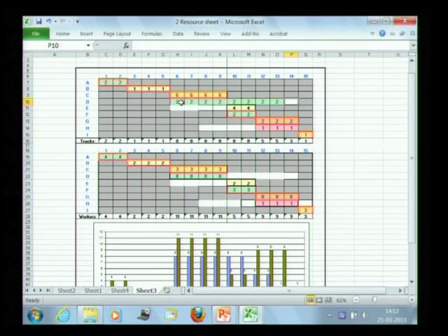It might change certain things in some places, it might not, but now it has actually brought my whole truckload down to 8 trucks. It's a potential strategy which a project manager might choose to use, and this happens in reality. Something is not available, they say let the activity continue, but we'll continue it at a slower pace. The quantum of work will take longer to get done.